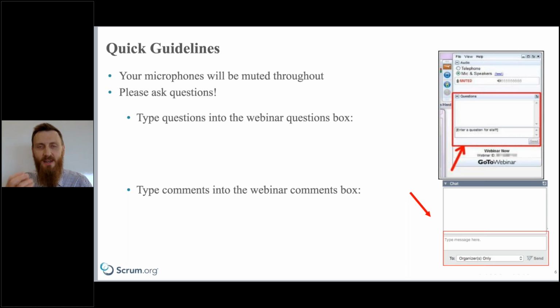The analysis is good. How we did analysis in the past is where things always continually fell apart. When you are taking all those big batch requirements and putting them into a locked-in scope document that sometimes gets put on the shelf for months to years, and then you pick that back up, there's all that extracting of the rich conversations that you didn't have when you're rehashing those to go build the solution. And this is why we get solutions that we didn't want at the end of long cycle projects.